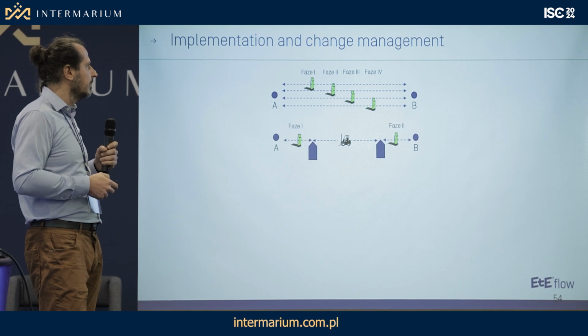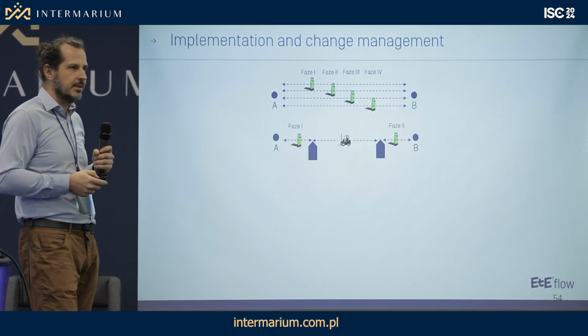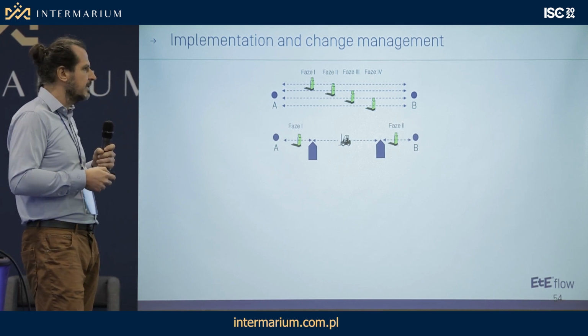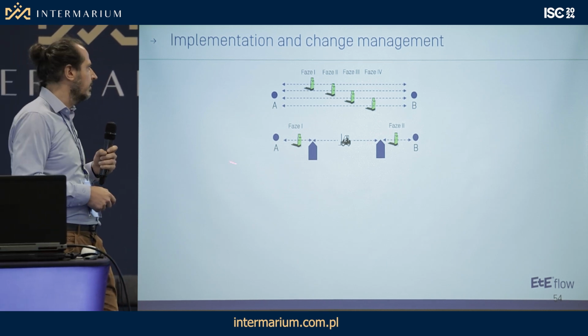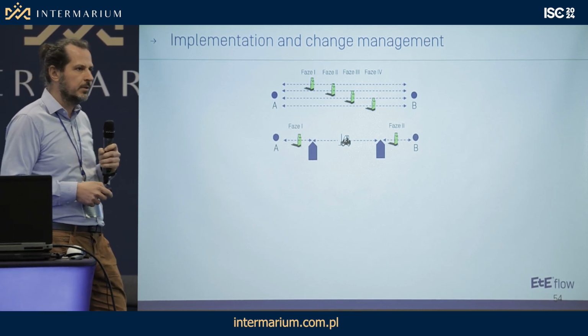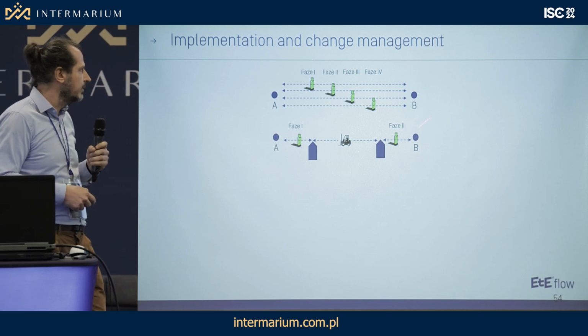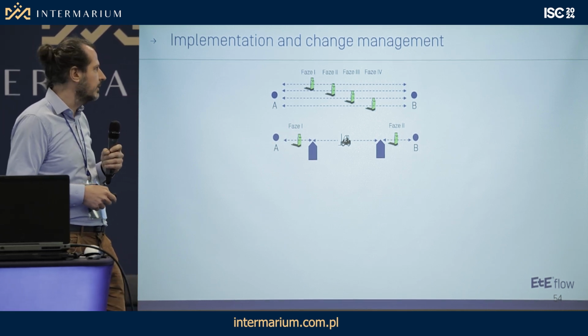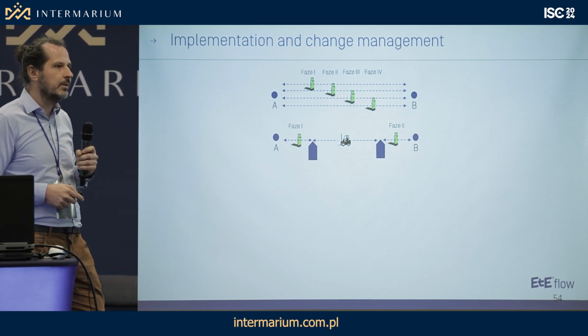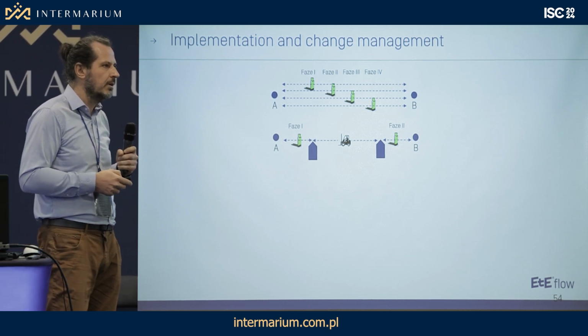So the second approach that divides the project into some phases gives us the ability to introduce 2 robots at the beginning, maybe the first robot as the interface for the machinery part, the second robot as an interface for the wrapping machinery part, and let's leave the middle point as it was, 1 forklift driver.